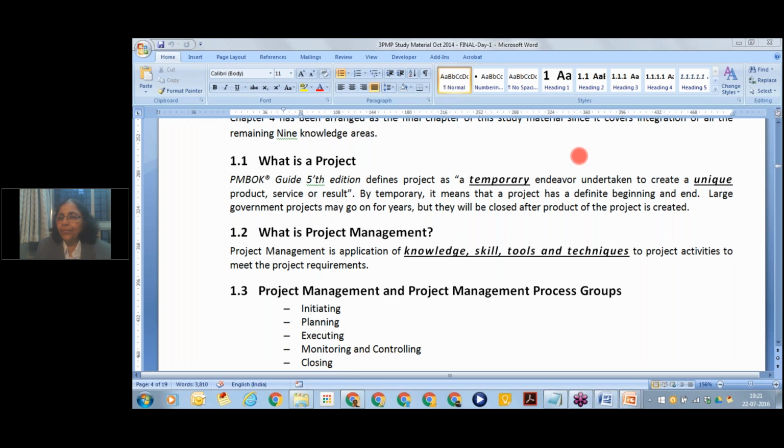Yes, Nasir, what is it? Increasing the scope will definitely give more money from customer if the scope increases to that extent. Okay, small extensions usually don't give you money. And what happens is you need to retain the customer. So it's difficult to ask money for small extensions from management's perspective. We'll be discussing this in stakeholder management again. But when they are giving more money, the money doesn't come to project. The money goes to my management, my organization. The budget they have sanctioned for a project doesn't increase unless the scope increases considerably. For considerable scope increase and considerable more revenue, yes, we would get more money.